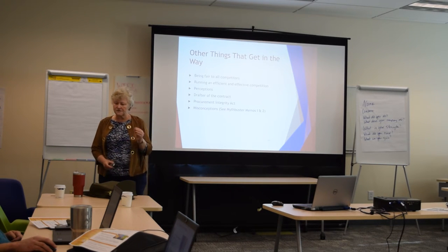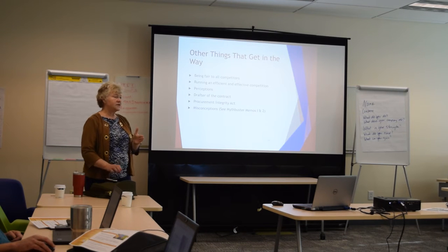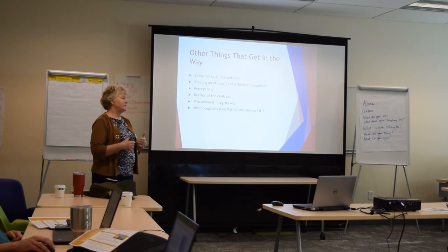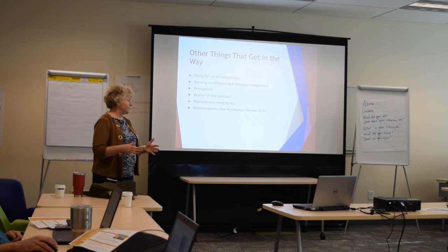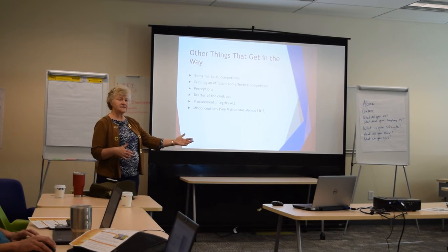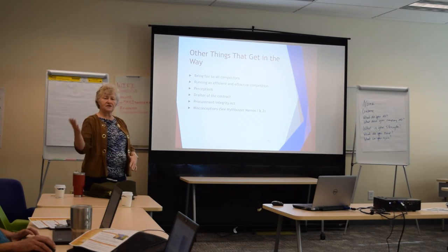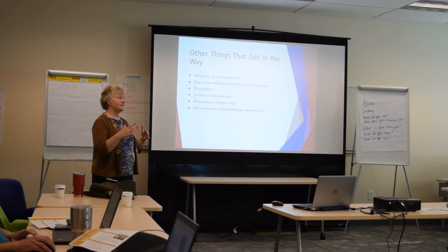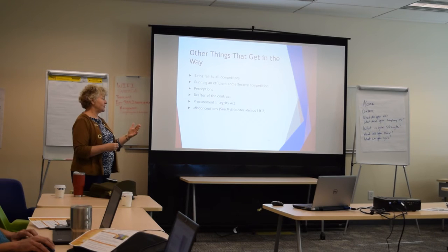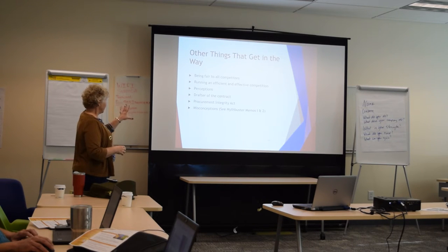And a lot of people don't know this, but they're actually on schedule to get these procurements out the door. So you might have a contracting officer that has maybe 50 different procurements that they're responsible for. Now they have contract specialists that work for them, that do all the legwork, and they're on quotas to get so many things done. And they get very frustrated because if they're in class, they're not working on this stuff. Their buildings may shut down at 5 o'clock. There are a lot of issues about actually being able to meet these procurement milestones. So they've got that going on.